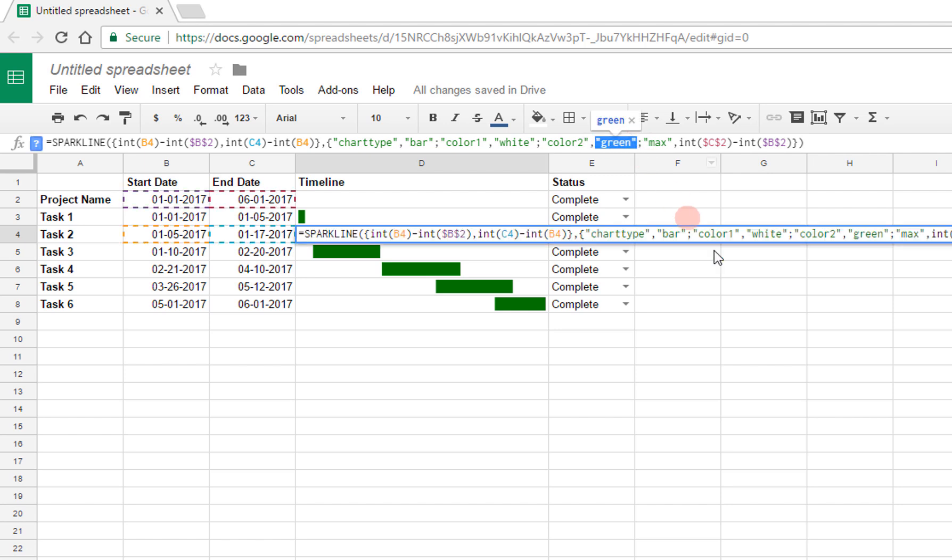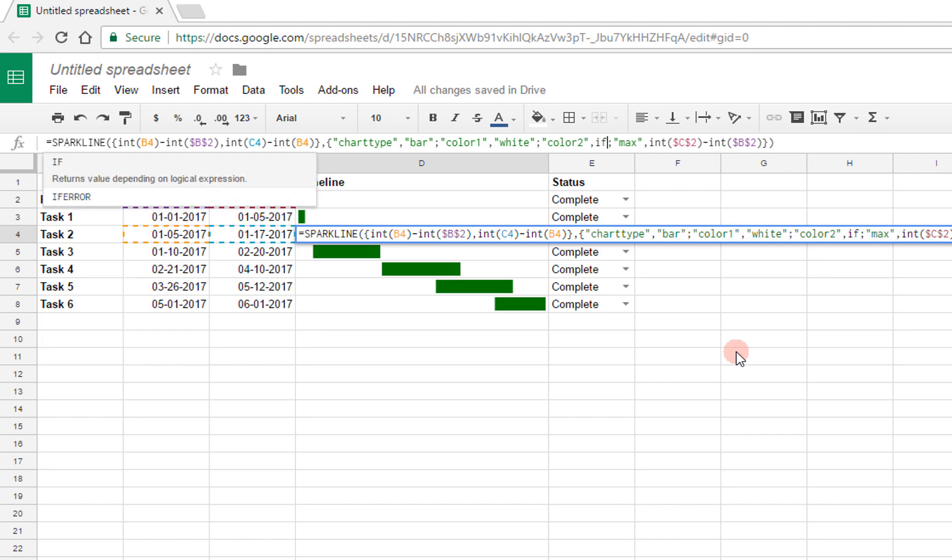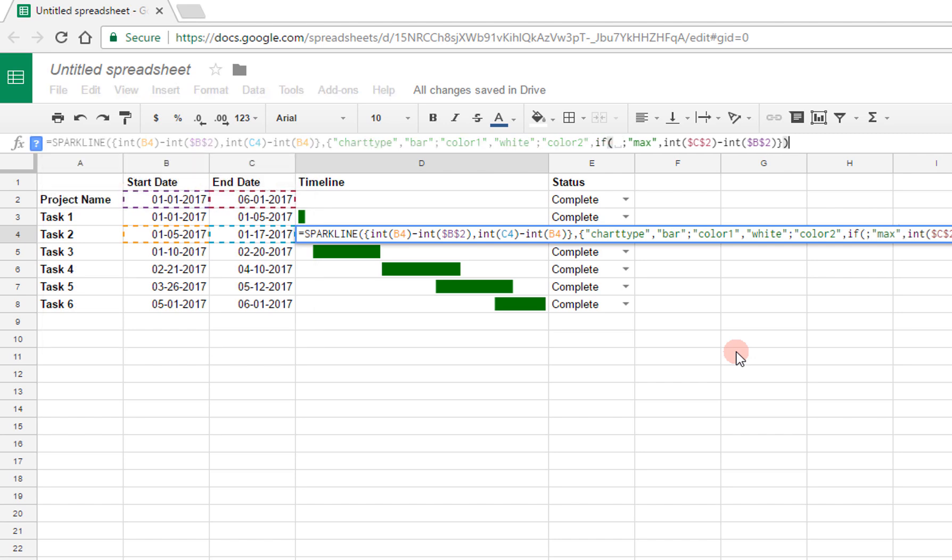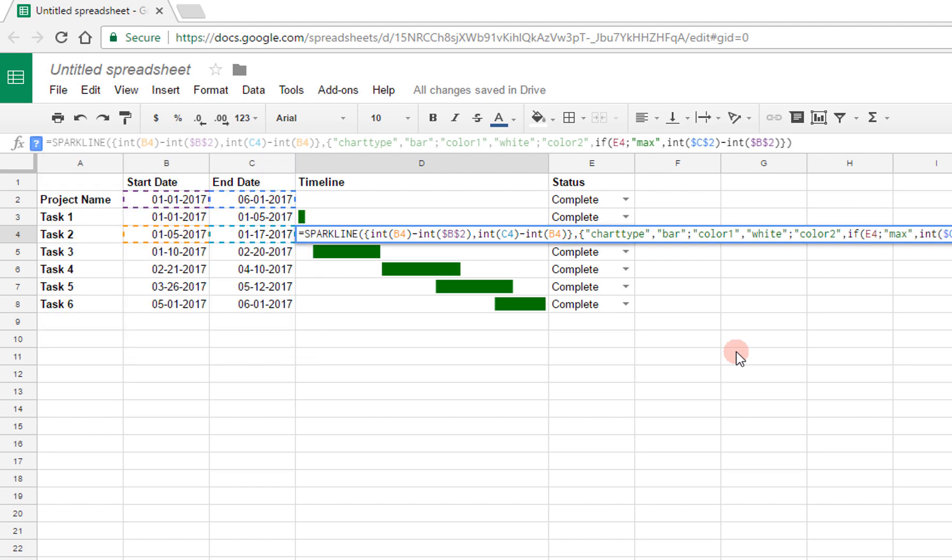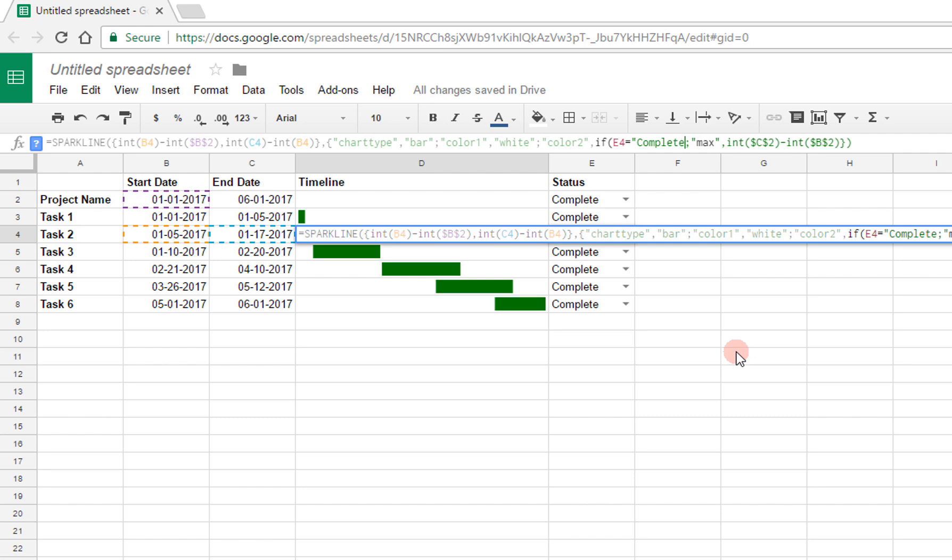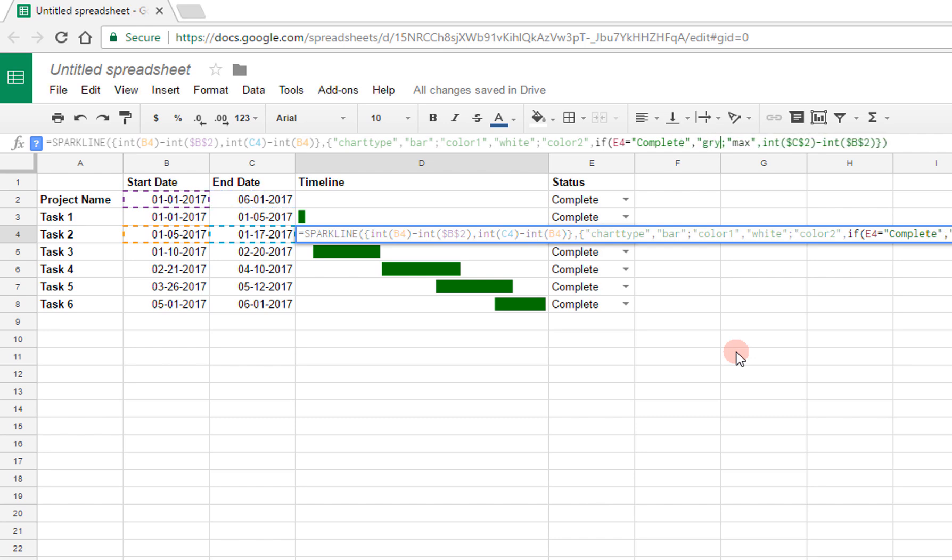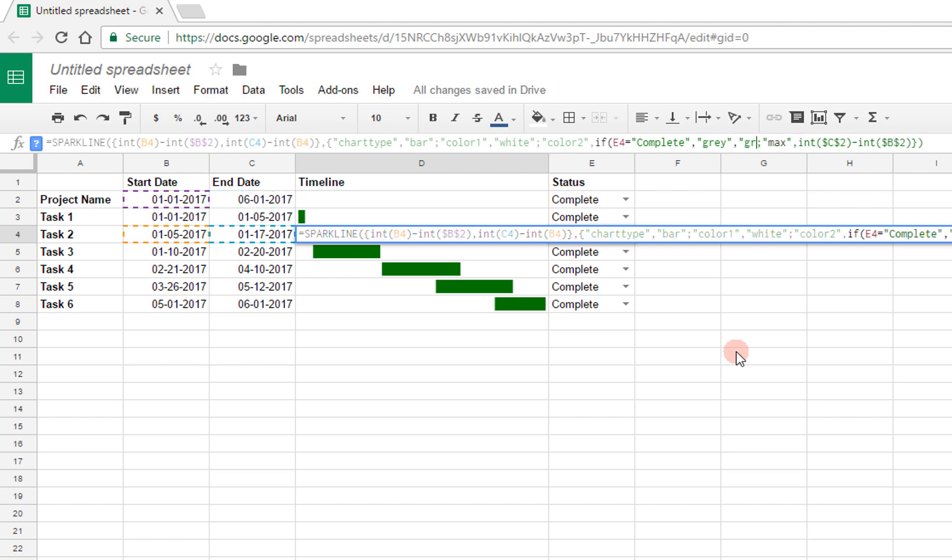So instead, I'm going to replace this with an if statement. I'm going to say if, and here I'm going to start referencing my fifth column, the status. I'm going to say if E4 is equal to the word complete, then I actually want the color to be gray. And then the way that things work is I can provide a third argument, and that's going to be like the else. And so here I can say, for example, comma green, and close that out.